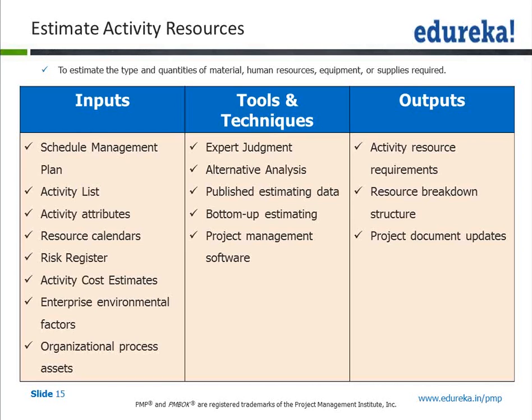After that, you need to assign resources in terms of man, material and machine, because it is with this set of resources, based on their resource calendar availability, is what will give you the actual estimation as well as the actual start and end date of your project. And this will also allow you to find out your cost of the project.